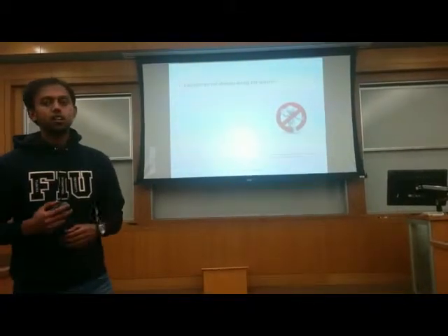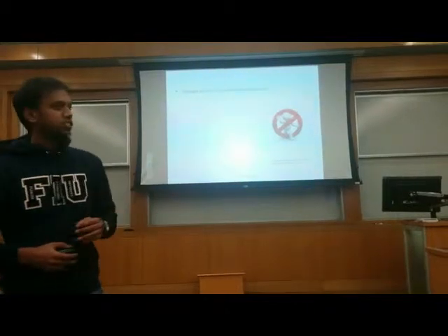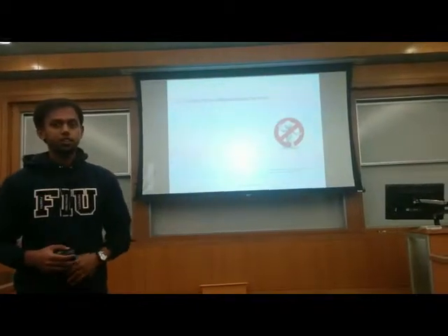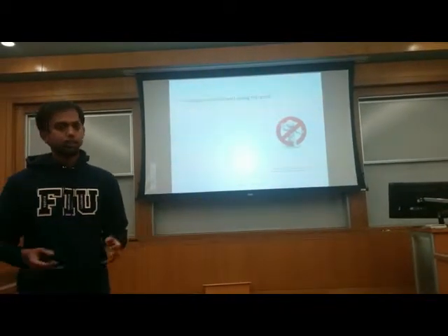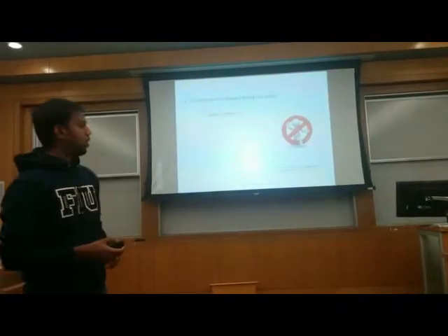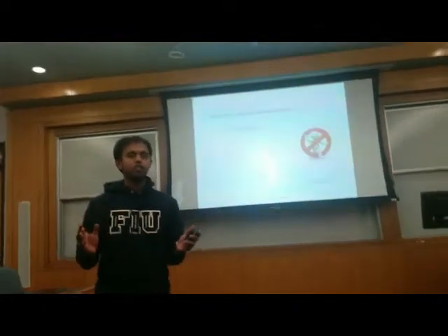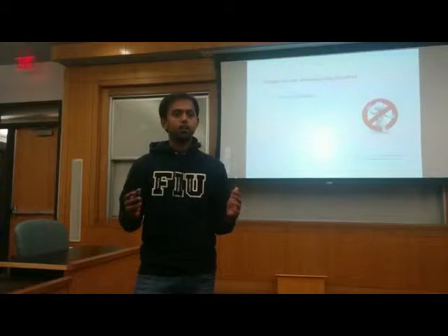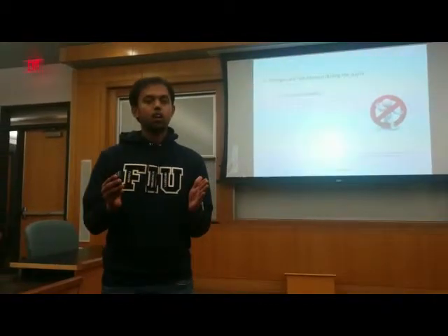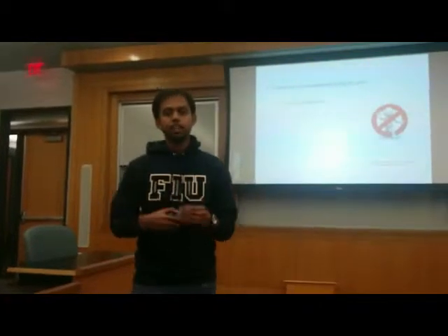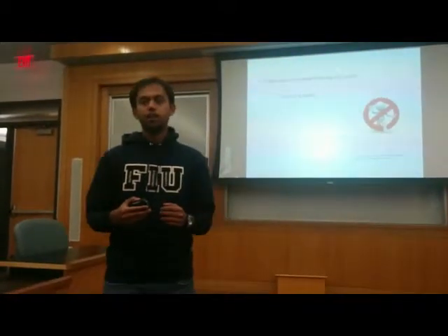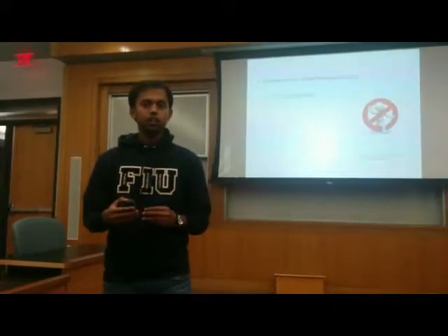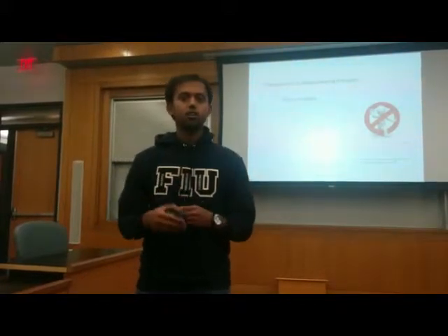And the third rule says changes are not allowed during the sprint. In the picture, we can see an example where the product owner is trying to come up with a change in the middle of the sprint, which is not allowed. The author says that there has to be a zone of stability, so that there is no distraction for the developers. When the sprint starts, each and every team member starts working on the tasks, so that they can concentrate only on the tasks and on accomplishing the sprint goal.